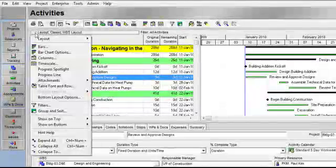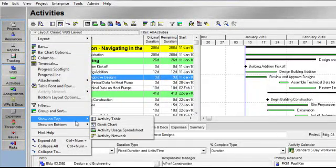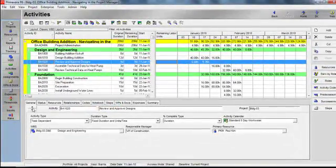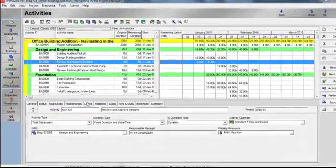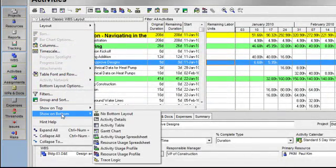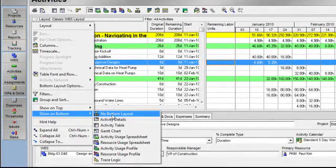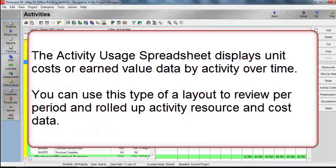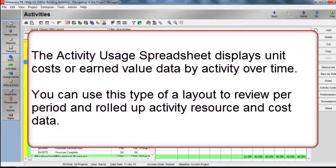I'm going to go back to my Layout Options bar, Show on Top, and view the Activity Usage Spreadsheet. Additionally, I'm going to get rid of the bottom layout, so I'll go back to my Layout Options bar, Show on Bottom, and indicate that I do not want to display a bottom layout. The Activity Usage Spreadsheet displays unit cost or earned value data by activity over time. You can use this type of layout to review per period and rolled up activity, resource, and cost data.